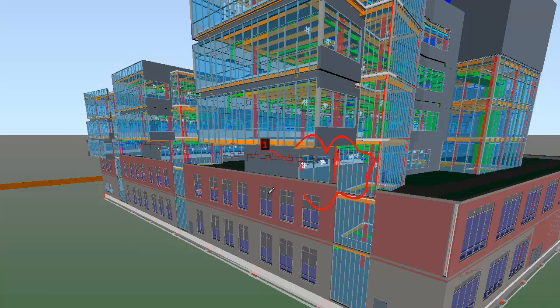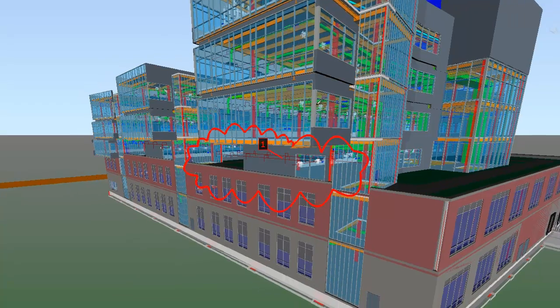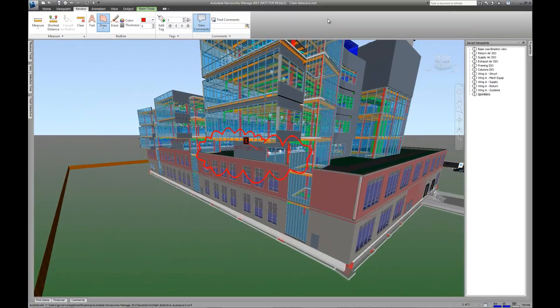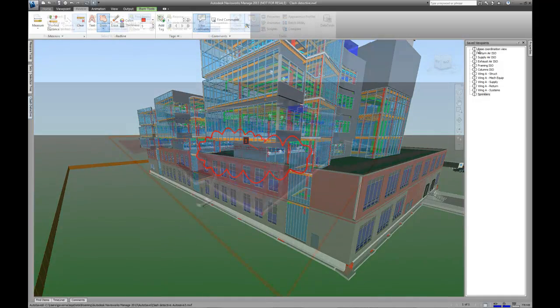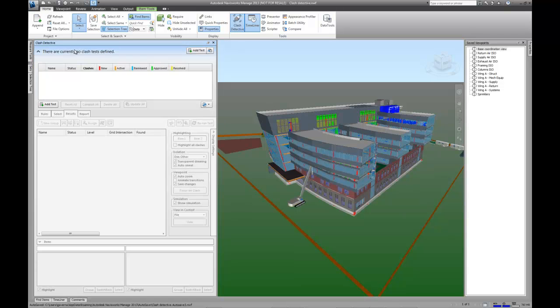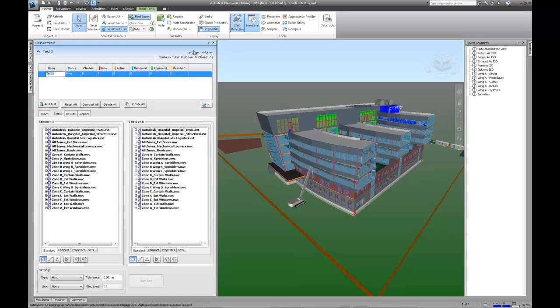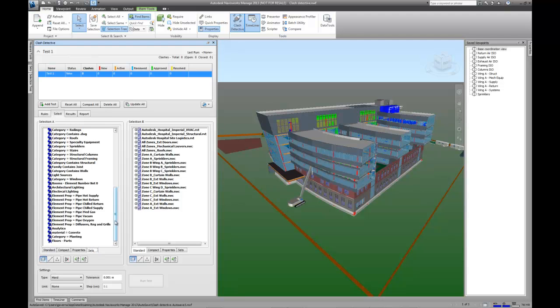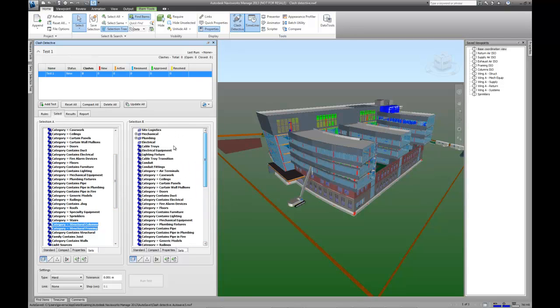The traditional coordination method involving overlaying 2D drawings on a light table is extremely time-consuming and unsurprisingly prone to many conflicts going undetected until encountered in the field. When you bring together design data that has largely been developed in isolation, issues can be expected. While coordination practices currently exist using 2D paper drawings, using a model-based approach enables a more efficient and robust digital process where you can visually see the issues.